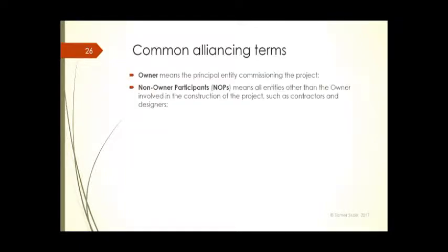So in order for you to know the techniques, we have the owner and anyone else is a non-owner. We call them non-owner participants, or NOPs. Why do we do that? Because who's going to pay? The client. And who's going to be paid? These people. If they are behaving well, they will be paid on top of the cost. They will be paid overheads and profit. If they don't behave, they will be only paid their fees.